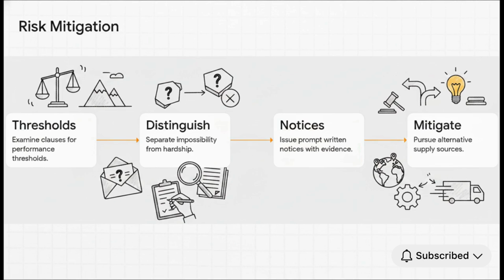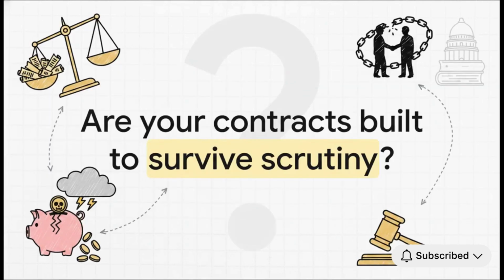And finally, and courts love this, actively pursue alternative supply sources to show you acted in good faith to mitigate the loss. You absolutely have to document that effort. So we leave you with this question. Your contracts might look absolutely ironclad on paper, but are they truly built to survive the intense scrutiny of the